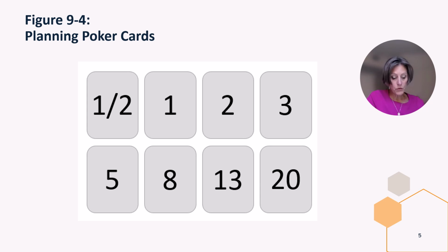Some Scrum teams directly translate the consensus effort number from planning poker to story points. Story points are then tracked on the project burndown chart during a sprint to indicate completion of product features. The total number of story points for a sprint represent the incremental project scope committed by the Scrum team.